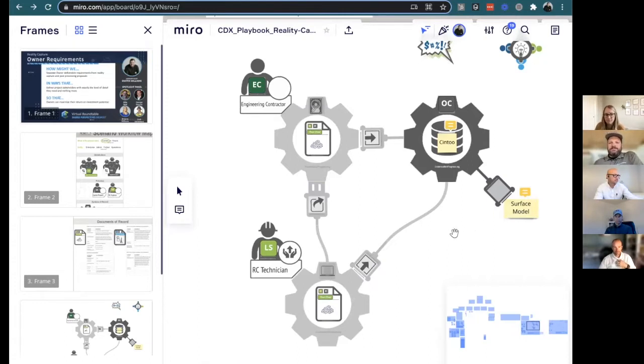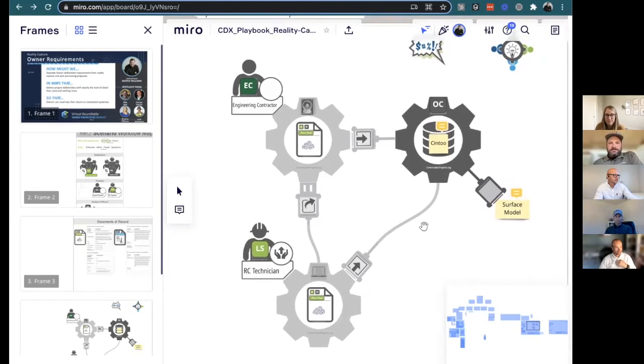Yeah, I can give you just a brief overview of how we're approaching this. From this drawing, we start a project and take our standard for the scanning. One of the pain points we had was that in the past we used to have to send people all over the world to do scans. We've now boiled it down to using a local scanning agent, and as long as they provide the information by our specification, then we can take that information.